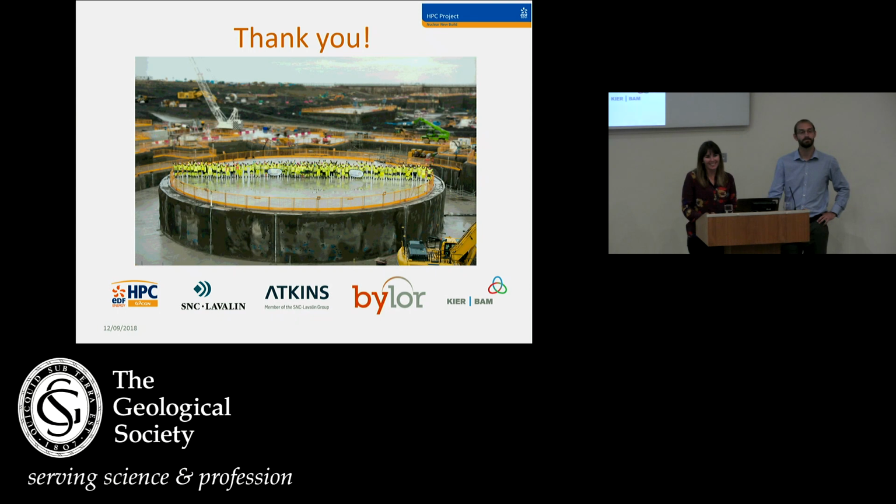Just quickly, testing's fine and you've got to do it, but for goodness sake, make sure there's a geotechnical engineer looking at it. Once again, KIABAM, and then it's overseen by NFB. So we have a direct hand, and we have to sign off directly on all of the testing that we see or that's undertaken. What I mean is it's the observation. Testing is a very small sample. Yes. The observation is the important part as well. Yeah. So we've got a wide surveillance team that go out and watch placement of a select percentage of it. And we can see erroneous results when they've done it wrong as well.